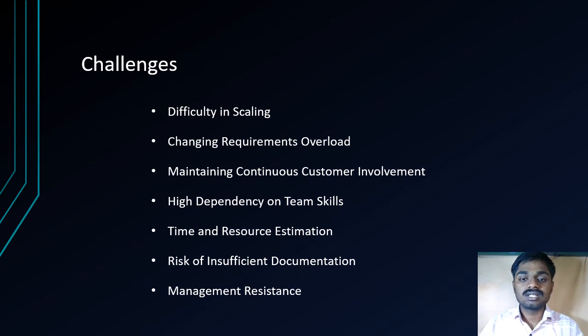Agile welcomes changes, but too many changes or unclear requirements can lead to scope creep, where the project expands beyond its original objectives, causing delays and added costs. These are the things you need to face in agile development. And maintaining continuous customer involvement, as agile depends heavily on regular feedback from stakeholders.